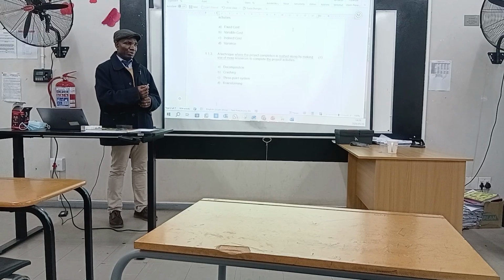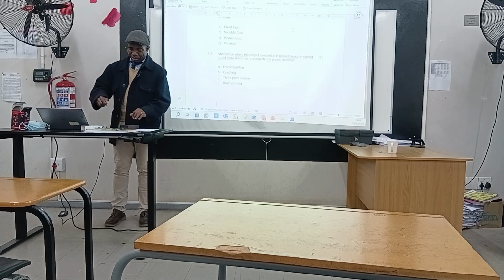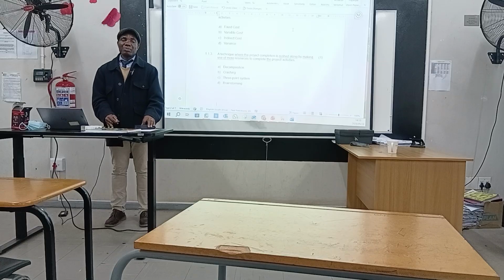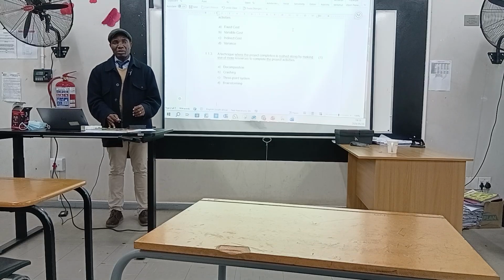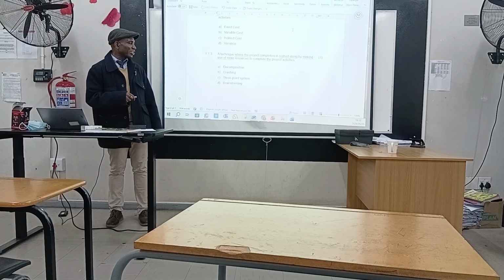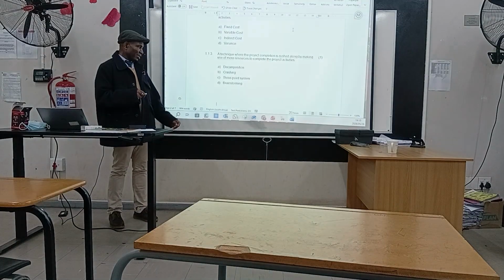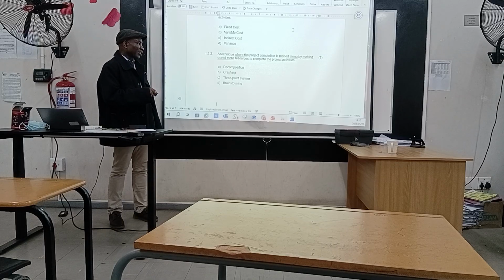So it might come to that kind of situation whereby you need to hasten up. That is the literary word we can use there: hasten up the project in order to finish before time. In project management, we don't call it hastening, we call it crashing. Right. So invariably, what I'm saying here is the correct word that needs to be applied here is crashing.